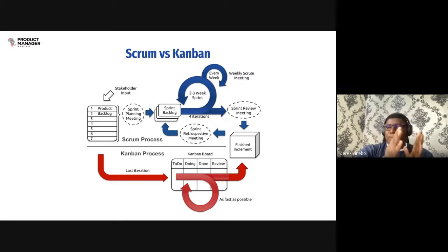Now, the product backlog allows you to easily prioritize what's the next thing that would actually enter into what we call the sprint backlog. Now, we have a series of meetings that actually happen in Scrum. When you have items in the product backlog, we have what we call a refinement or backlog grooming to help carve out these tickets. Is it actually ready to be picked up in our sprints? Has it been estimated? Have engineers seen it? Do they even know what it involves?